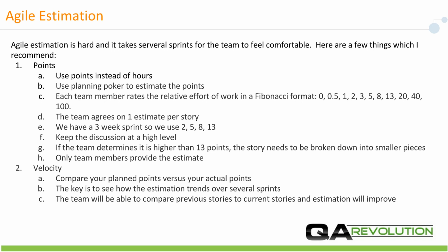It's also a good rule of thumb that the product owner or the scrum master don't really need a vote. Only the team members who are doing the work should provide the estimate.